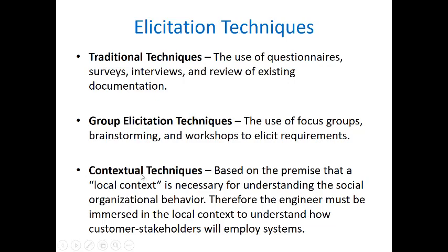The other method is contextual techniques, where it's not really easy to understand the expectations from the system by just interviewing the customer. In these scenarios, it's better to spend some time with the customer in the context in which they want you to create the system, to understand really what they want. Sometimes, especially in projects that have some social components, this technique may be used. So you may need to spend some time with your customers to get a better understanding of what they expect from you.